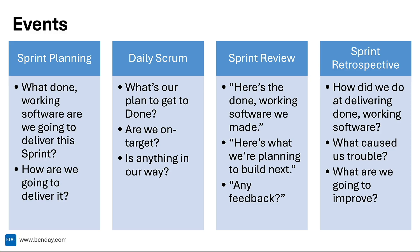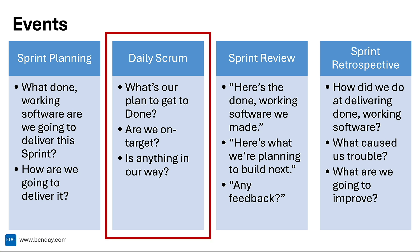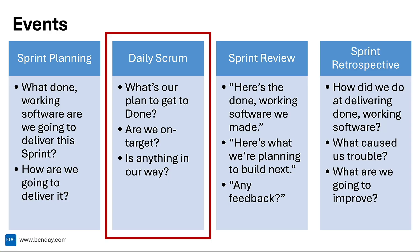The daily Scrum is one of the four events in Scrum. It happens every day, it's 15 minutes or less, and it's intended for the team to come together and ask the question: how are we doing? What's our plan to get to done? Are we on target for getting stuff to done? Is anything in our way of getting to done? So thinking about the stuff that's in our sprint backlog, looking at that plan, reviewing that plan, and adapting that plan if necessary.